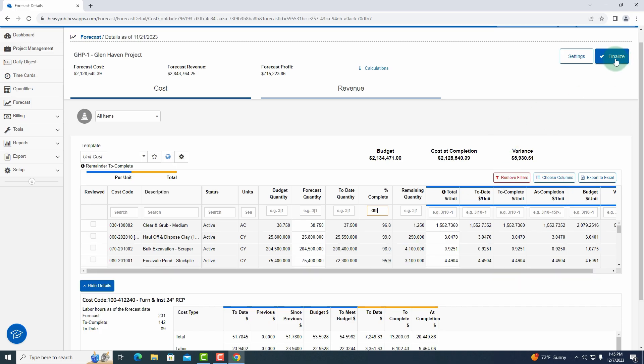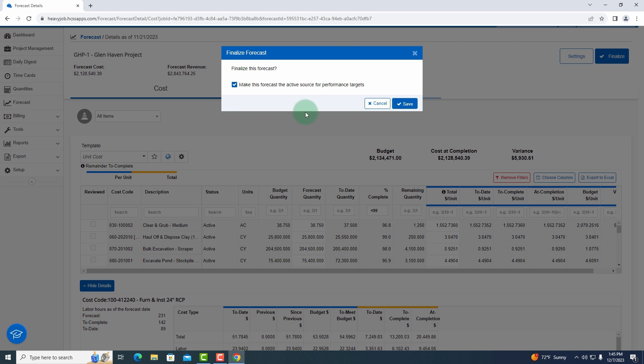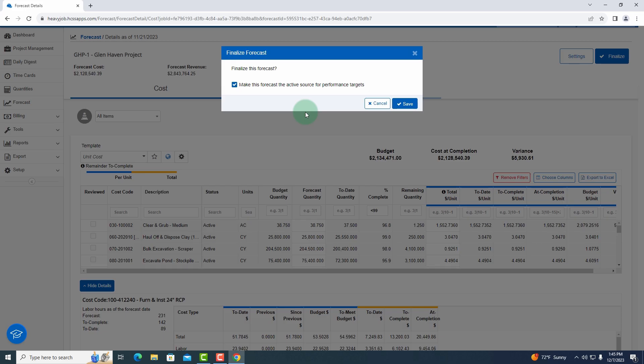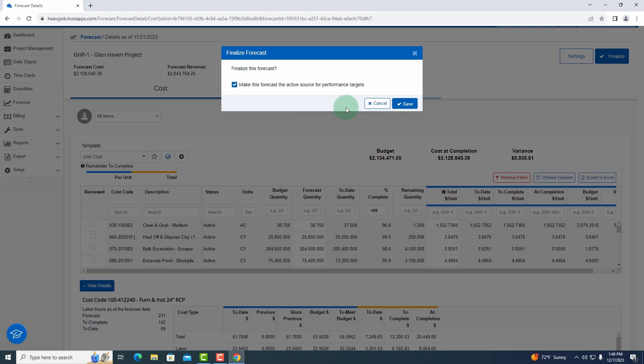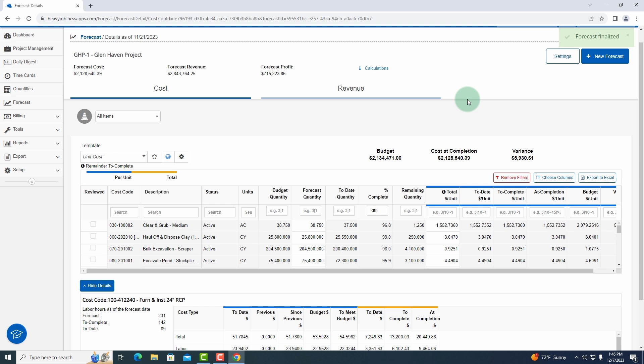We can then click on the finalize button in the top right, and the key thing here, one of the things we want to focus on is that now that we have new forecasted dollars, we want to share that with our field users. So there's a button right here that says make this forecast the active source for performance targets. So now when your foreman goes into their time card analysis, they no longer see that $51 as the target, they see $60 as the target. So as conditions change, they can now see where they actually need to hit on that dollar per unit. I will save this. Now my forecast is complete.